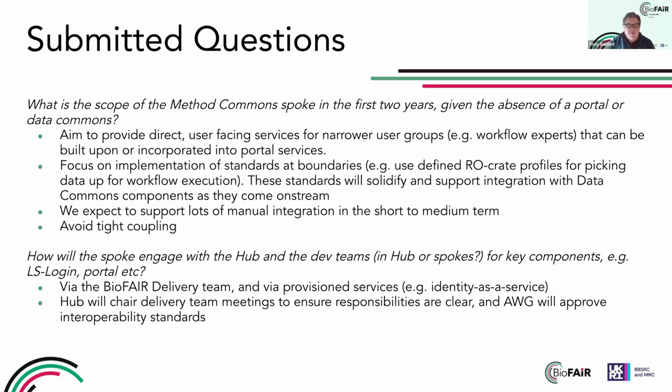I also think it's important to think about standards. So with the functional specification, the AWG are thinking very hard about making sure we've got very clearly defined standards at boundaries. So, for example, that's thinking like the boundary between the data commons and the methods commons. We'll use defined RO crate profiles. So, making sure that you've got an example of a place where the Methods Commons can pick up a RO crate profile and push it into an execution of a pipeline primes for integration with the data commons later.